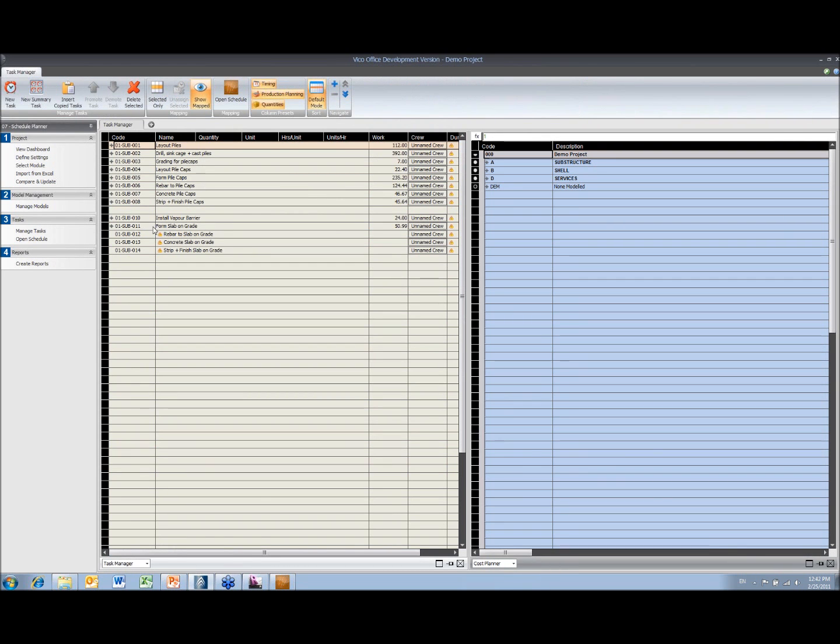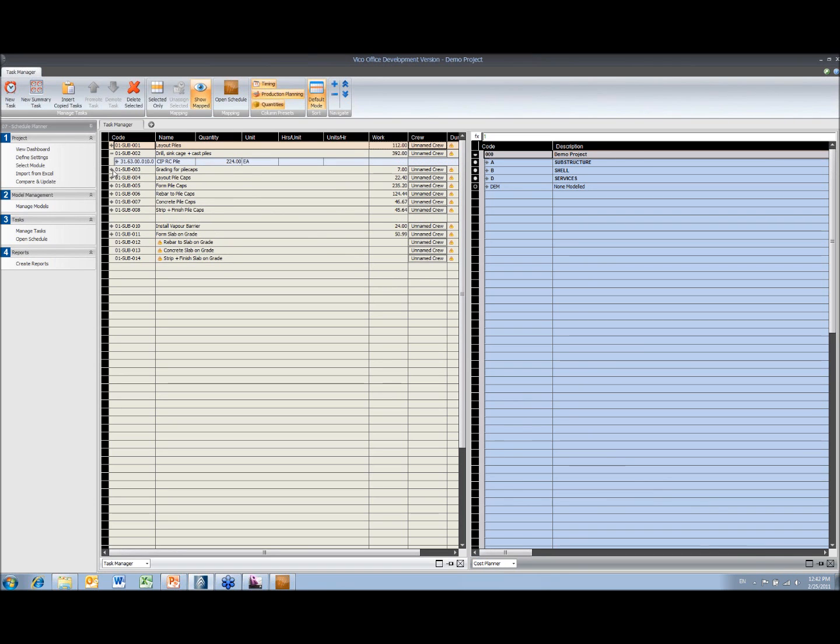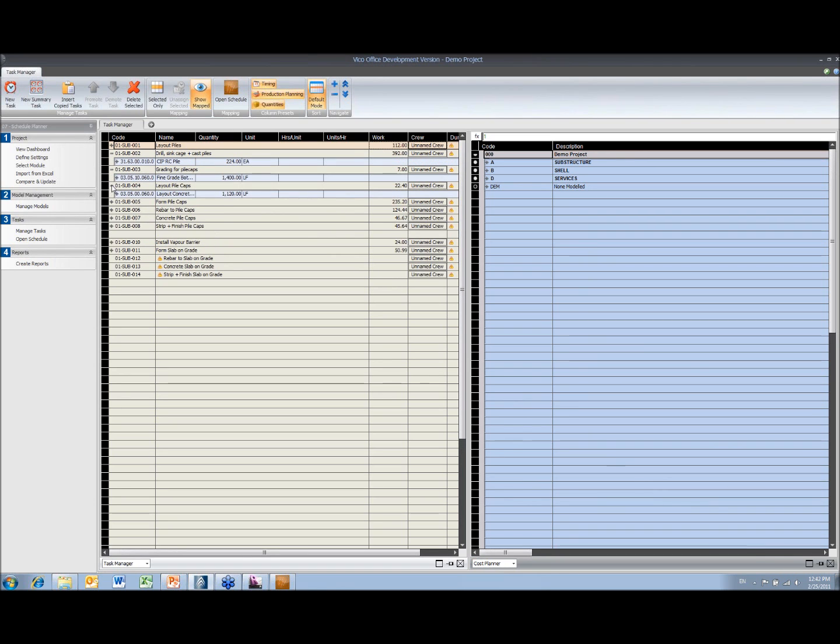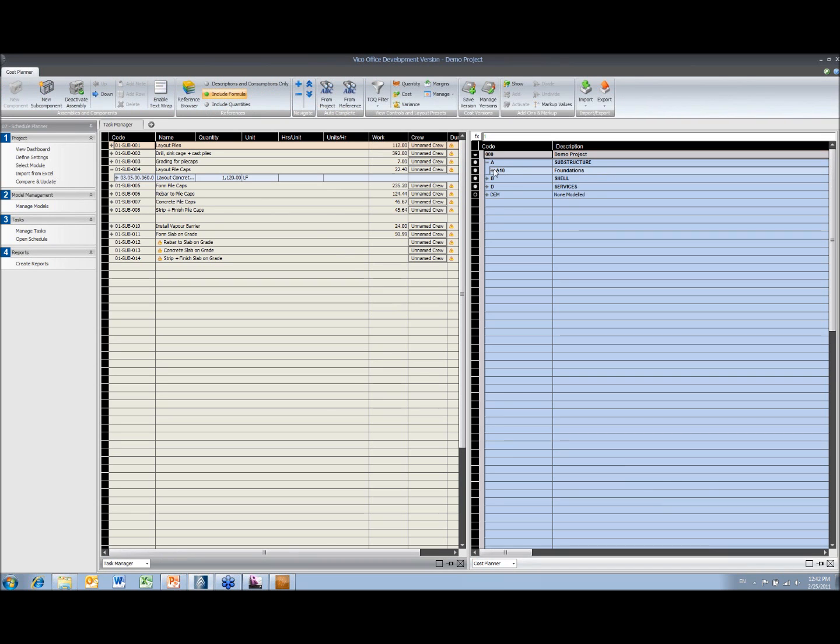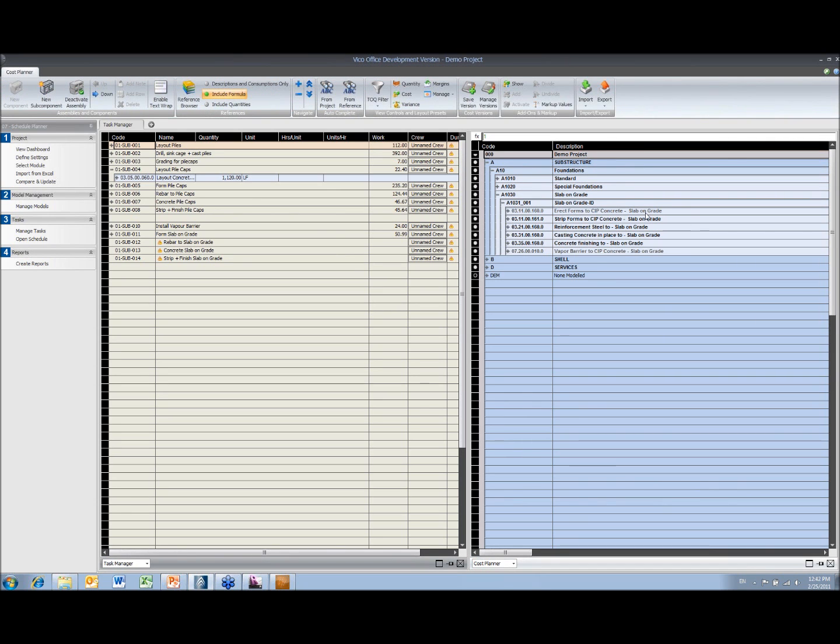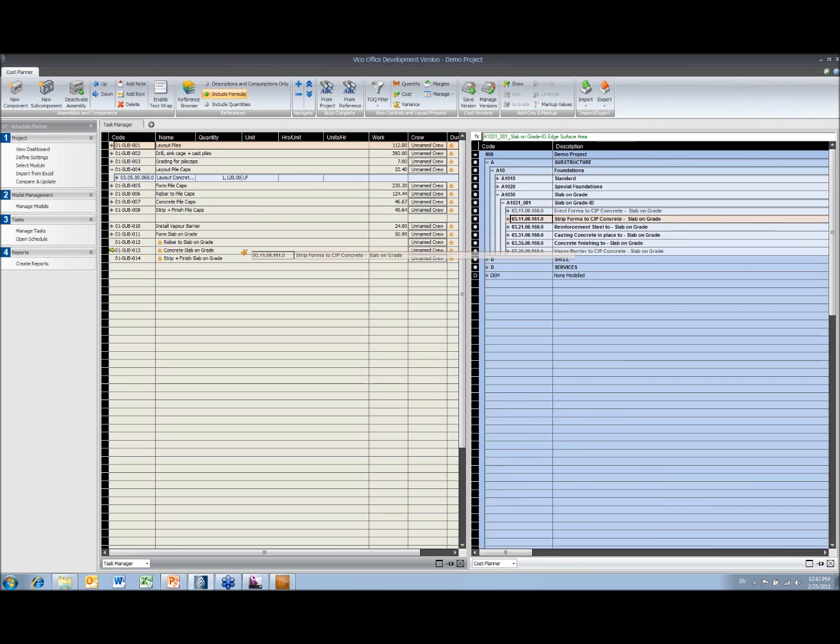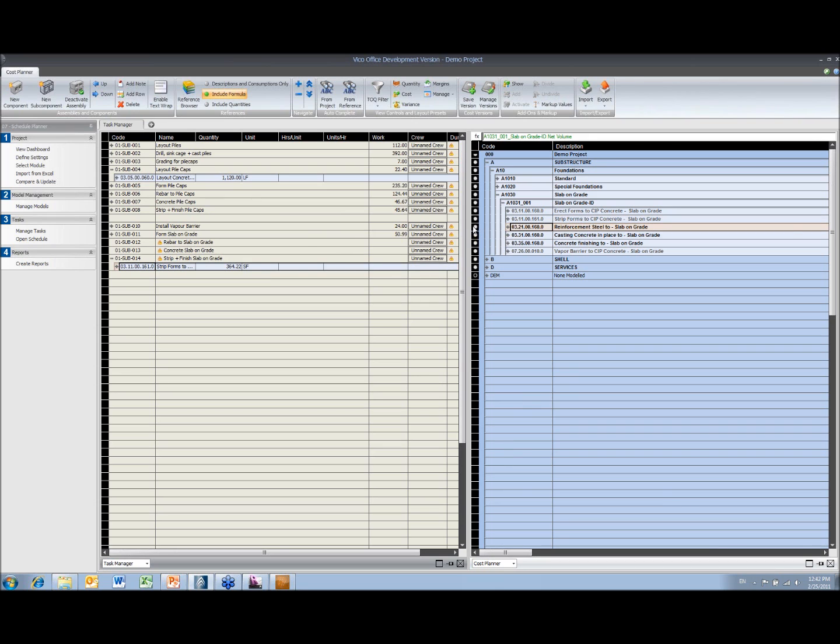So we've got some tasks in here. These three don't have anything allocated at the moment. Just the same as we did in the previous exercise, these have already been allocated from the cost plan, and you can see my slab on grade items. We can also see that in here because the ones that are allocated are grayed out. So I'm just going to allocate these ones by dragging and dropping as before.